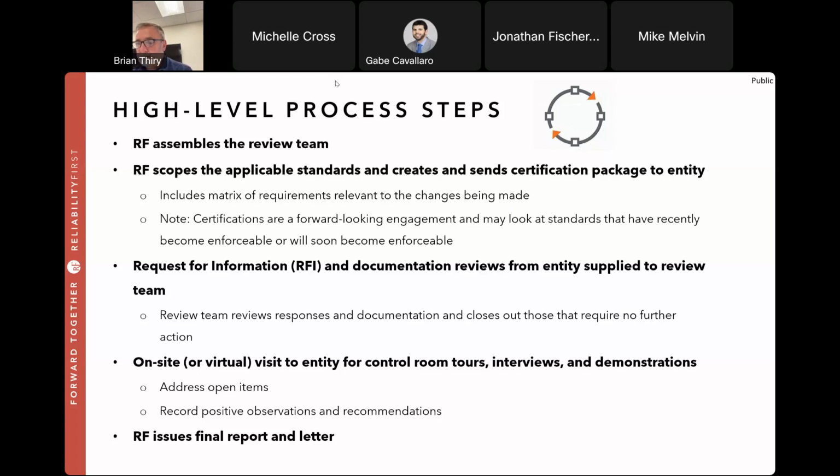Yeah. So addressing open items such as, maybe training is not complete, maybe process documents are not complete. If there's things that are open that are not critical, you can still go live, but provide a schedule of when you're going to complete those things. Now, I can't tell you exactly. There's certain things maybe that you completely missed. Well, you can't go live until you close those high-risk items.